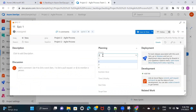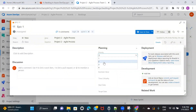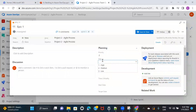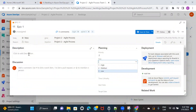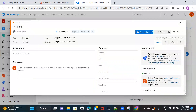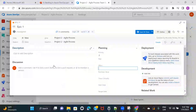On the right side you can see Priority — if this epic is highest priority choose 1, lowest priority choose 4. In the Risk field, if there are blockers, complexity, or anything you feel is a risk for completing this epic, you can mark it as high, medium, or low. Effort is where you define how much time it's going to take to complete this particular epic's development.